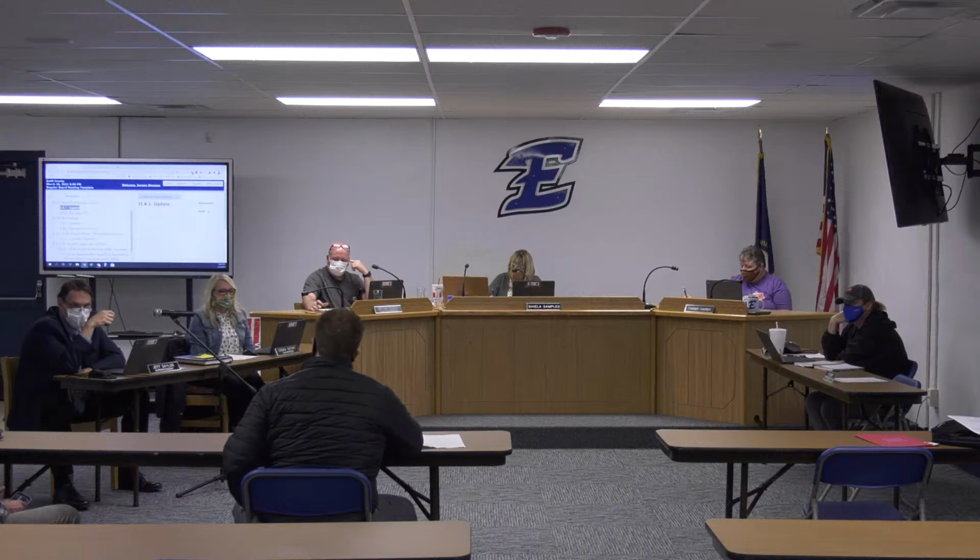But we are able to get temporary occupancy and have you all in there well before that time. The plan is to give it to you all on the 1st of July. That way you all can get your teachers on board, get the equipment in, and be ready for the school year, August 2021. That's pretty much that side.